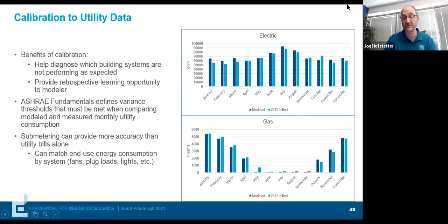When there are RFIs coming in, or change orders, don't forget about the value that this tool can bring in helping analyze a change like that. It's really pretty quick to run the results and provide that objective feedback to the team of why we can or cannot move forward with a change.